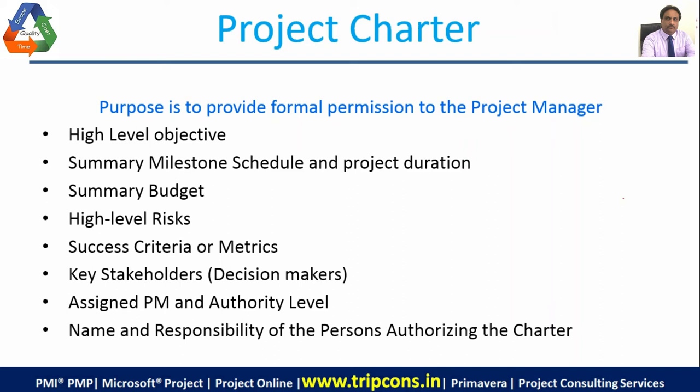Now, why do you need this in the charter? Say down the line, a senior management person comes to you and wants you to change something in the project. Would you do it? No, you wouldn't do it. What would you do? You will look at your charter. If his name is not included in the key stakeholders, that is the decision makers, you wouldn't make any change. You would politely say, sir, can you please go and meet one of these people? These are the key decision makers. Can you please go and meet them and ask them for any change in the project? That is why we have the names of the key stakeholders included as part of the charter, so that no other person can come in and make changes in the project.